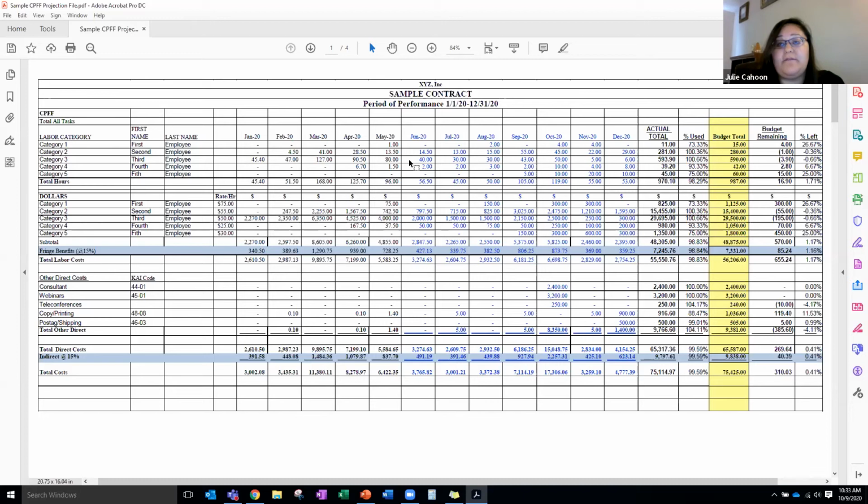What you'll be looking at from month to month when you're doing your budget management is the shifts from the actuals versus the projection. You'll make adjustments to your projections month by month as you learn the actual time spent and other direct costs that are spent. So those are a nice visual indicator as you're working through. Using color coding can often be helpful in that way.